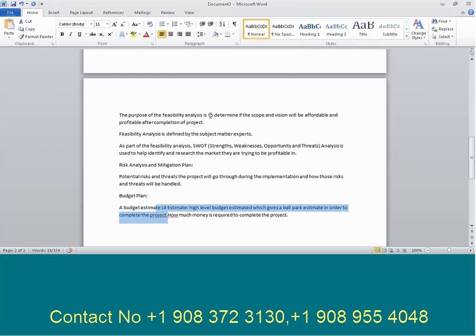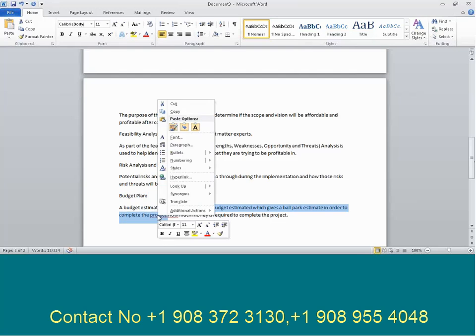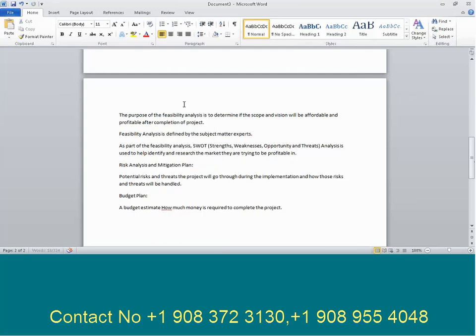Yep. So what happens is now the technology team, the business users say, I think you're asking for too much. Why do you think you would need $1 million to implement this? Give me some more details. Give me a breakup. So the breakup is given in another estimate which is called the L1 estimate.